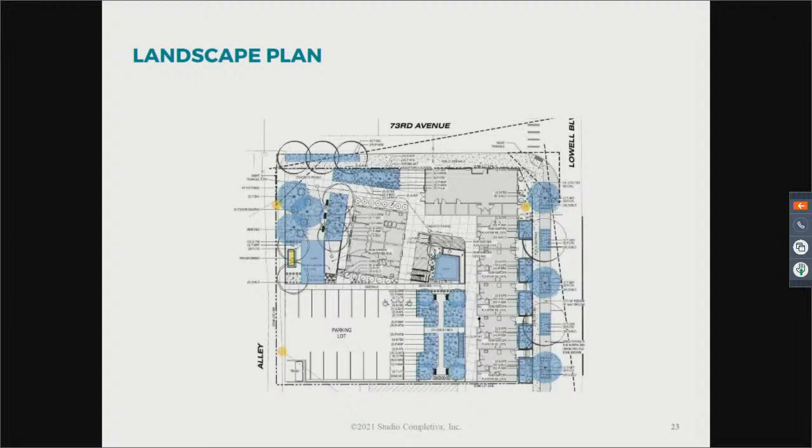Okay, and I imagine too, if that south property developed, that would be addressed at that time, that those would be undergrounded then. It would be, but Dino had asked the same kind of question, and I am going to run it past the city engineer and see if we can't get a CIP project, so capital improvement project, for doing the undergrounding of all of those utilities that are running down there.